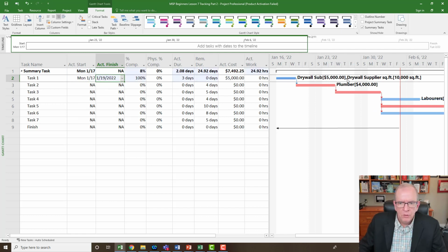All right. And when we do that, it pushes everything out. That's because we have everything linked. I spent a lot of time in one of the earlier videos discussing why you want to have everything linked so that you can see the impacts when something changes, right? So this is how this is potentially impacting the rest of the project unless you do something about that. That'll be an upcoming video: what do we do about it? How do we recover the time to get it back? And I'll give you a little bit of a heads up on that today.